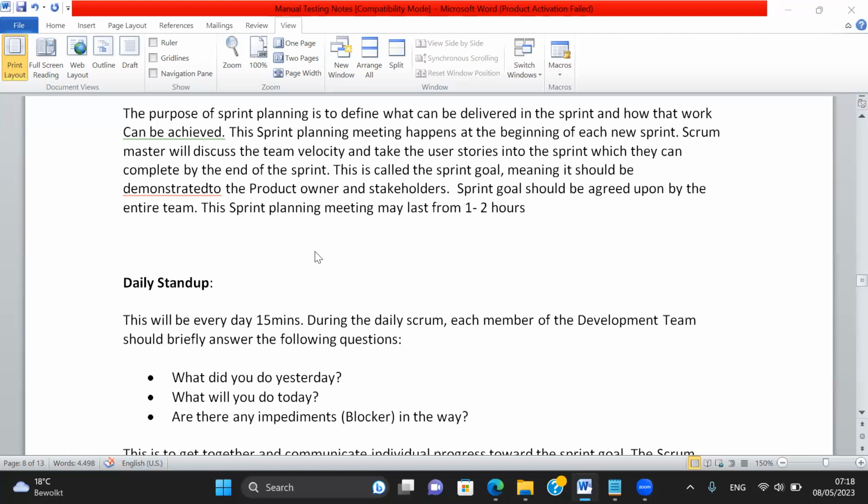And Farhana is telling, no, I am not available for the 2 weeks. Today only I am available. I am going on a long leave. I am not available for 2 weeks. In that case, they will not take any work for Farhana for 2 weeks. They will not take 1 week of work for Shravanti. They will plan in such a way that Shravanti works only for 1 week. They will take only small work for Shravanti. They know that Farhana is not going to work for 2 weeks, so they will not take any work in that sprint for Farhana. Yes or no?